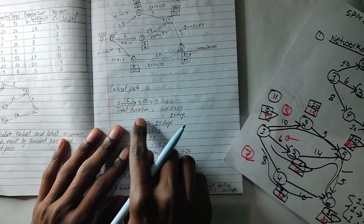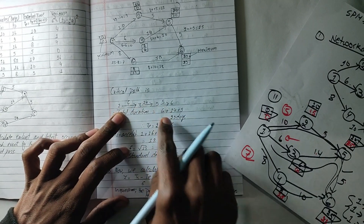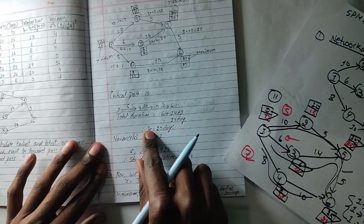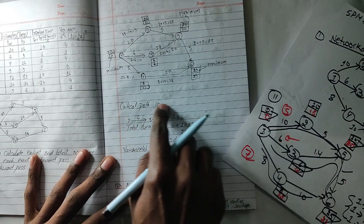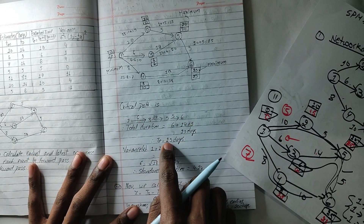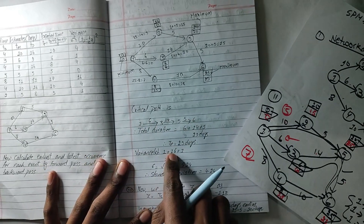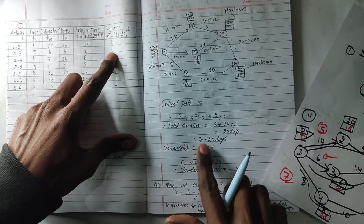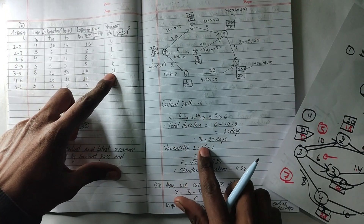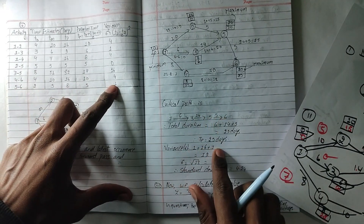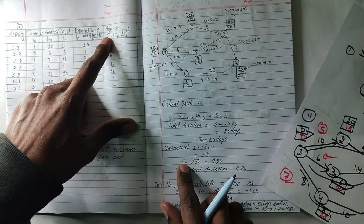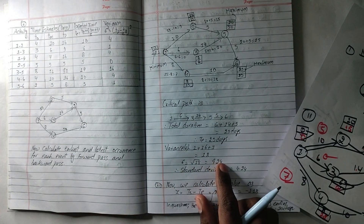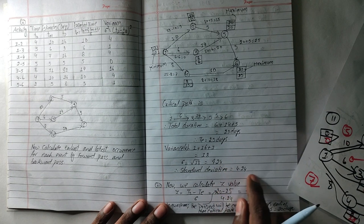The right answer is 6, 4, 5, which means 25. TE means total duration — this path means total duration of 25. There is variance: 3, 3, 1 — which means 1, 2, 1, 8 — between 3, 5, 1 — which means 18. Sigma squared equals 18. Sigma equals root of 18, which is 4.24. Standard deviation is 4.24.